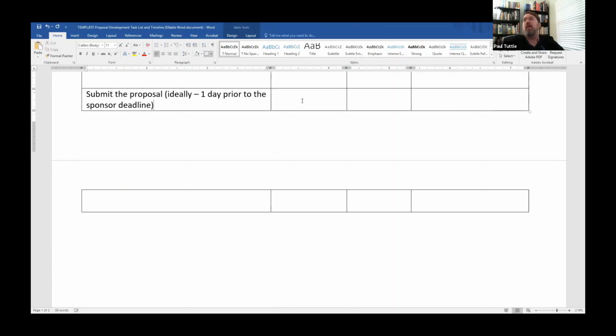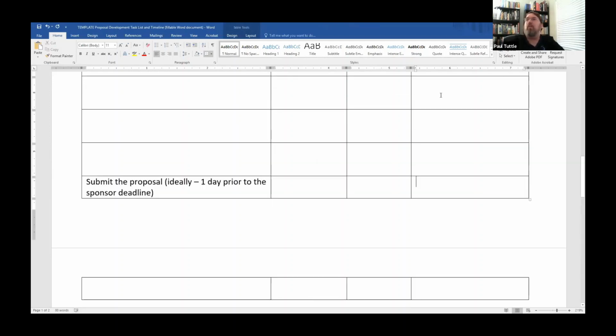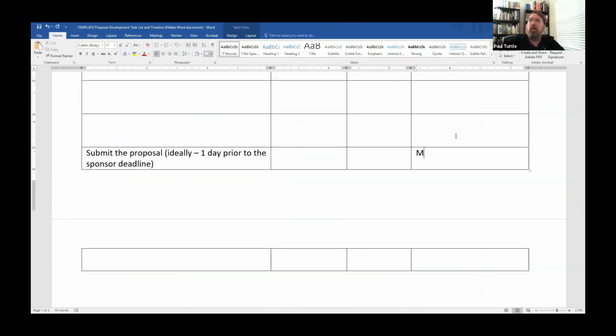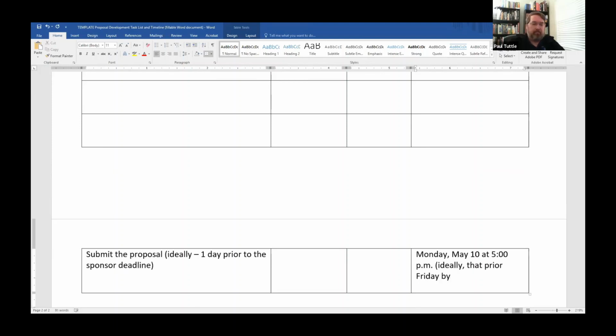Well, since there's no sponsor deadline, we're going to make a deadline, and that would be Monday, May 10th at 5 p.m. So our one day prior would ideally be that prior Friday by 5, if possible. We all know that this is probably not realistic, but we're trying to get people to understand not to do things at the last minute.